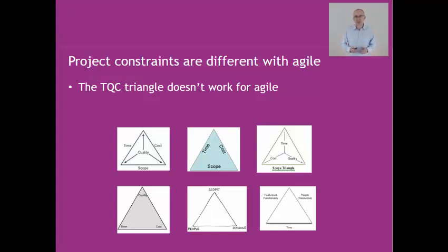So traditionally we played with time and cost, or time and resources. We either move deadlines or we throw bodies at a problem. This is not the Agile way of doing things. Agile, if you like, has brought in a brand new constraint which is called scope. So scope, features, requirements, functions, whatever you want to call it, this is the constraint or the variable that we play with on an Agile project.